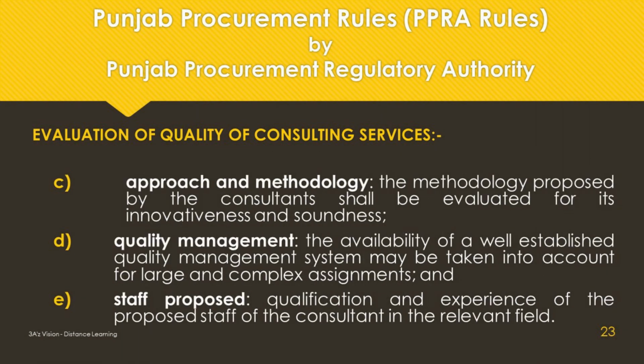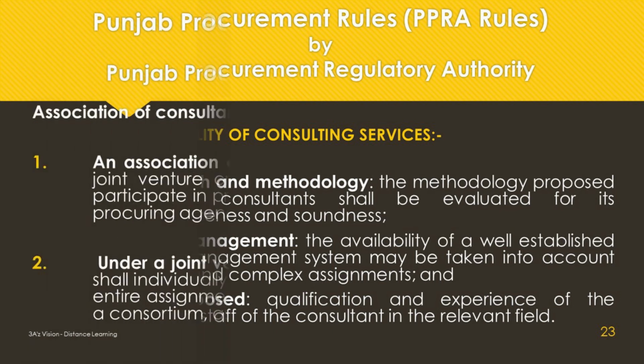Approach and methodology: the methodology proposed by the consultants shall be evaluated for its innovativeness and soundness. Quality management: the availability of a well-established quality management system may be taken into account for large and complex assignments. Staff proposed: qualification and experience of the proposed staff of the consultant in the relevant field.